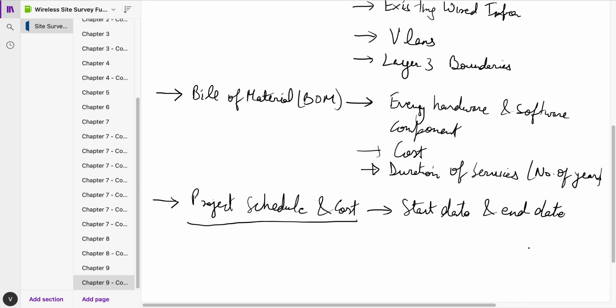Customers usually can deviate by a couple of weeks, but not beyond that. They'll probably put in a clause which will deduct your money when the handoff date is delayed by a specific amount. So you have to submit in 2 months or 3 months or whatever time frame you set. If you go beyond that, the money will be deducted.